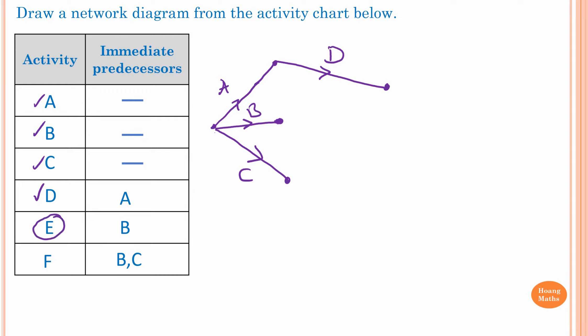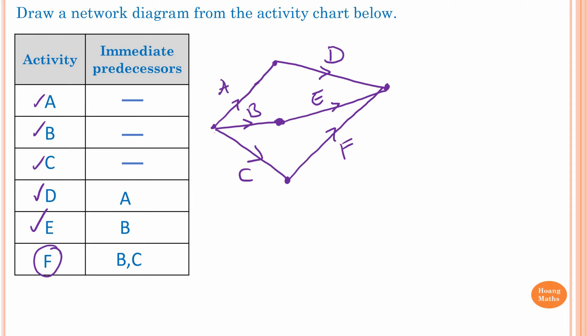To do Activity E, we need to complete Activity B first. So starting from B, we draw out and connect to Activity D — this is Activity E. And for Activity F, the immediate predecessors are B and C. I draw from Activity C first, connecting to Activities D and E — this is Activity F. But we also need to connect Activity B, so to connect B and C together we need a Dummy Activity. There — draw an arrow — this is the Dummy Activity, showing that F has immediate predecessors B and C.